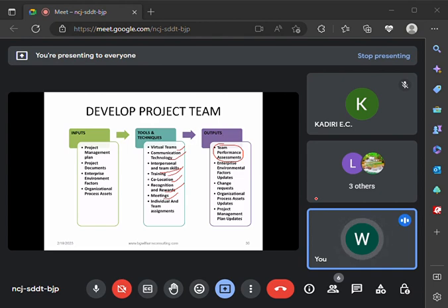Co-location, as it sounds, is that technique that a project manager uses to arrange the entire team members from each city to work together in one office. It becomes what? A co-location. Take note, for the purpose of the exam, co-location is also referred to as what? Tight matrix. So what is co-location again?